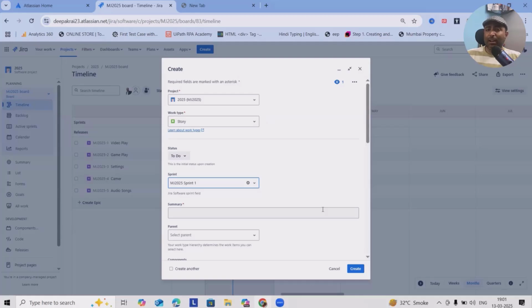Normally, sprints run from 1 week to 1 month. So 1 week means, if your company has weekends off, normally we will have just 5 working days in hand. In most cases, companies keep 2-week sprints, and these 2 weeks are majorly 10 working days. It means we have 4 holidays. If there are any additional holidays, those also have to be considered.